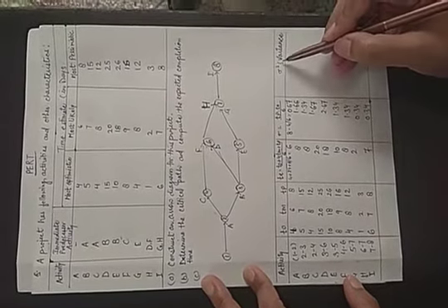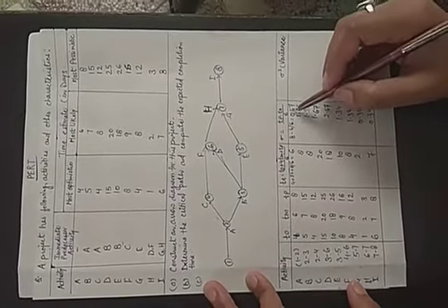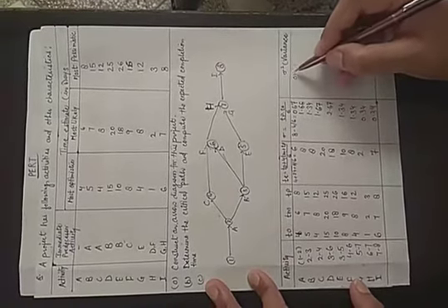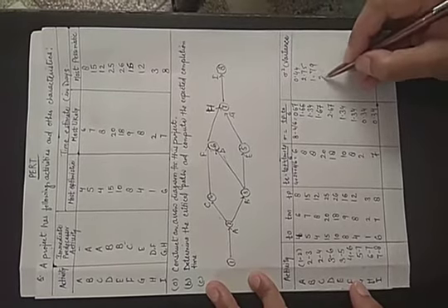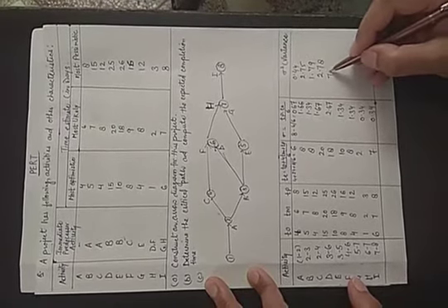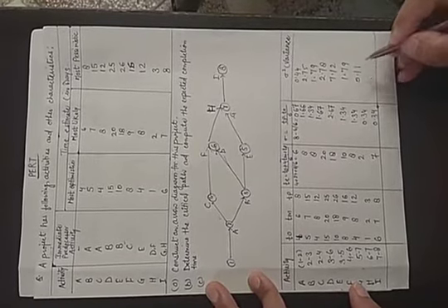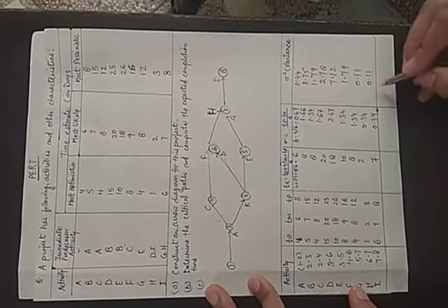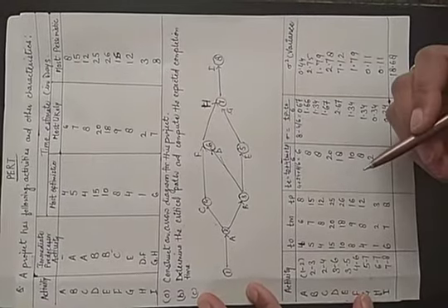Next we have to find the variance, which is the standard deviation squared. We will square each value. It will be equal to 0.44, 2.75, 1.79, 2.78, 7.12, 1.79, 0.11, 0.11, and the sum is 18.68.